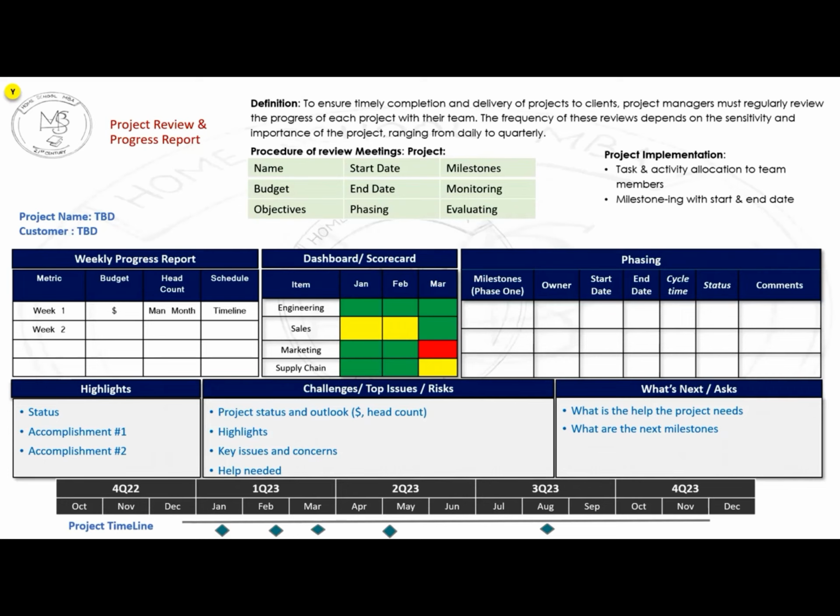And the progress that is still in hand, where you are struggling hard to complete the phase and you are likely to achieve the target, is shown in yellow, as you have shown in your template. And then red shows that this particular phase of the project is in trouble and it needs more attention.